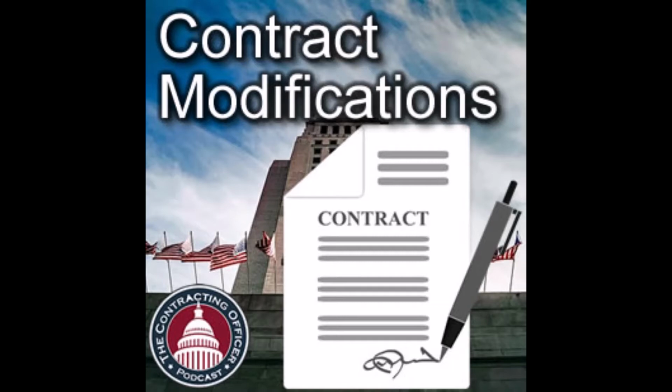Contract modifications, including changes that could be issued unilaterally, shall be priced before their execution if this can be done without adversely affecting the interest of the government. If a significant cost increase could result from the contract modification and time does not permit negotiation of a price, at least a ceiling price shall be negotiated unless impractical. And done. Close book on reading there.